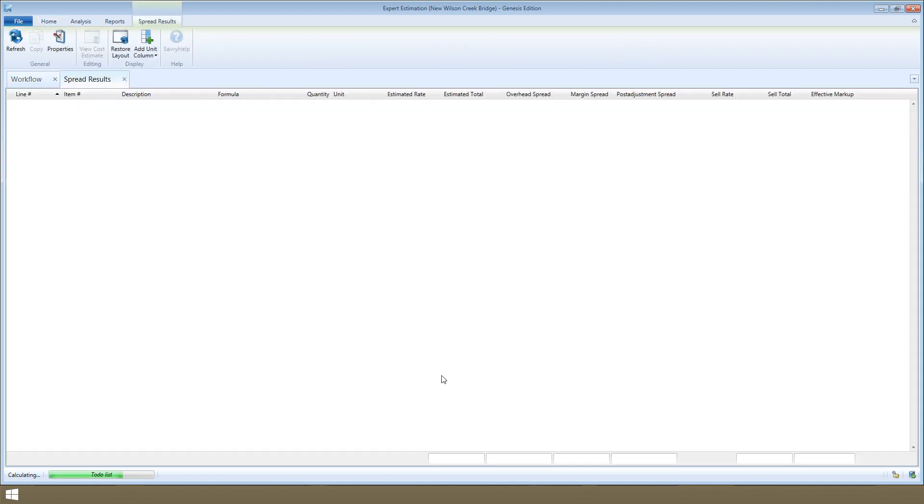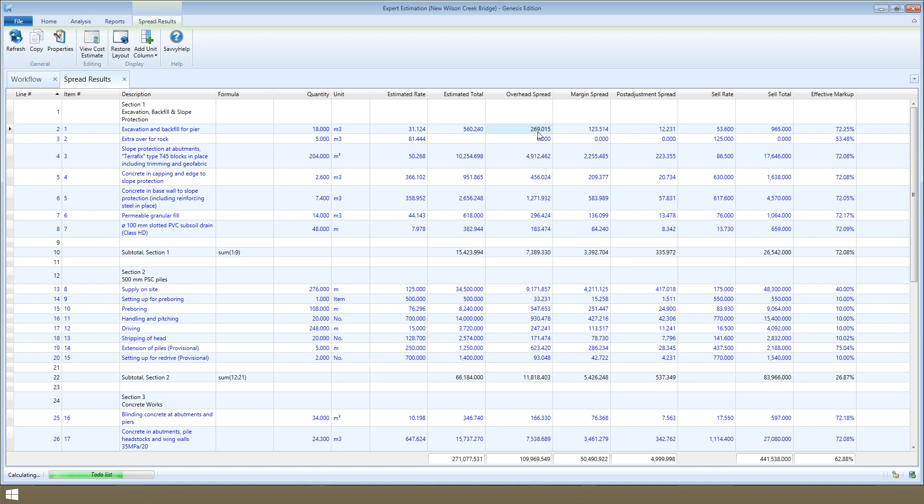This window shows you exactly how the margin and overhead costs have been spread across the direct costs of the project, so you can review and make sure you've recovered the margin and overhead exactly how you want to. You can see each direct cost item here, with the estimated total for each, and then the total overhead and total margin spread across each item.